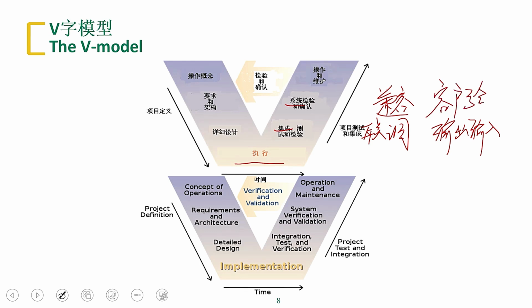Then I also need customer acceptance. Finally, in the customer's production environment, if the customer thinks it's okay, then our product has no problem, including the security he approves. Actually, this approval represents acceptance of the residual risk or remaining risk of this software. Your software may still have some bugs and problems because software always has some unknowns or vulnerabilities that cannot be detected, but I think I can accept it. Then here there will be a customer acceptance process, which is the acceptance report, the customer signs, and then enters the operation and maintenance stage.